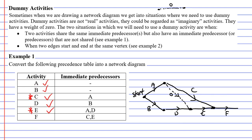So when we look at both of these, they have an immediate predecessor that is shared. They both have the immediate predecessor of A, as we mentioned that they share the same immediate predecessor. They also have an immediate predecessor that is not shared. Activity E has the immediate predecessor of D, but activity C does not. Whenever we get this situation here, we know that we're going to need a dummy activity at some point.